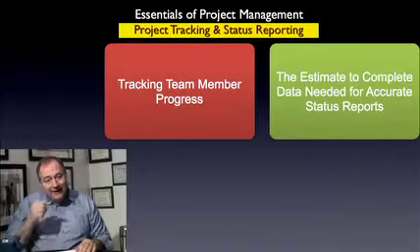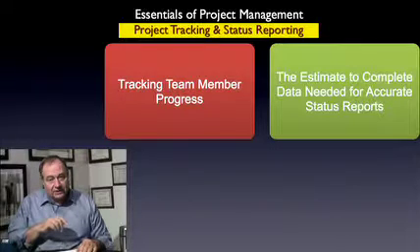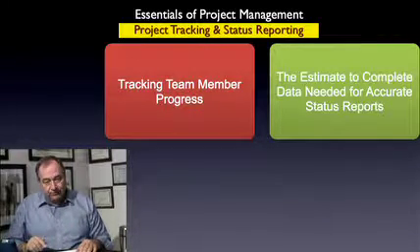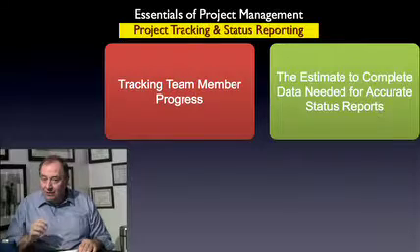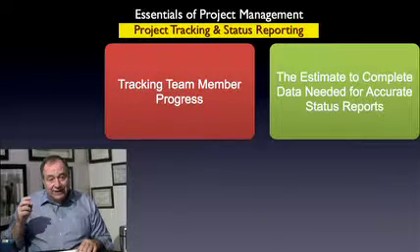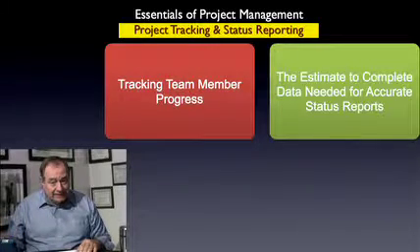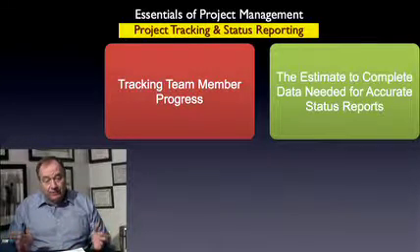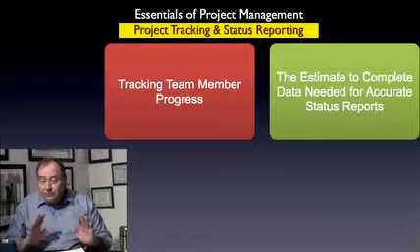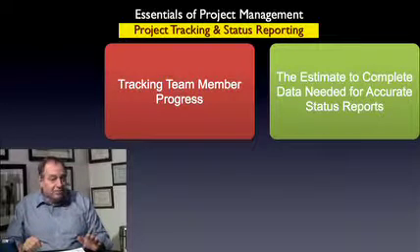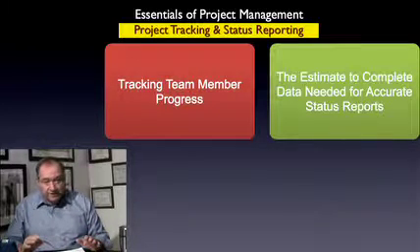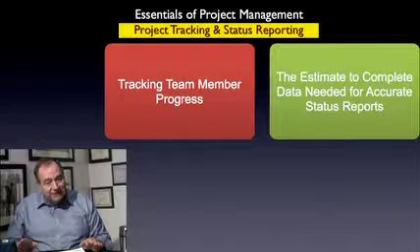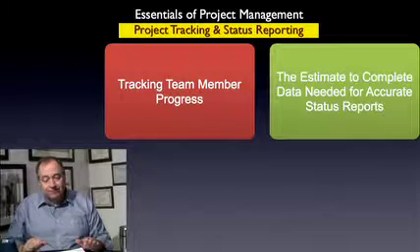You need to know how many hours the team member worked on the task in the past week. And you need to know how many hours they estimate it will take them to complete the task. The estimate to complete is really the key number. This won't take the team member more than a minute or so to do for each task. But you need this data to spot problems early.